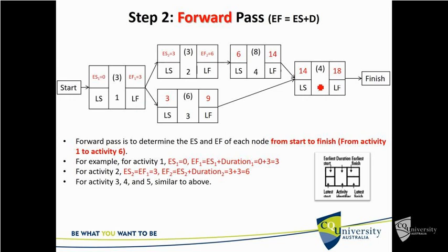Now, here we see that activity 3 has a start of week 3 because of this. But there's nothing after it until week 14. So in theory, you can move this activity backwards and forwards. You can relocate it. The resources that are here in week 3 may be useful up here. So this could be pushed out and you could work on this one. All that matters for this is it finishes on the 14 week. Sorry, not 14, 18 week. Sorry, even I got it wrong.